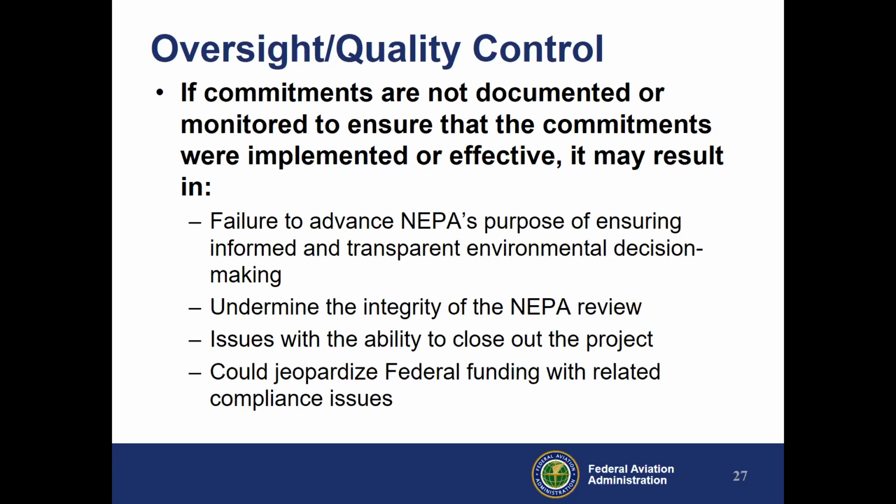I want you to understand that I'm reviewing all closeout reports, and I find a lot of issues with projects. We've found where a project did not build the mitigation site. We've had the action area change and result in additional impacts that never were mitigated or permitted.